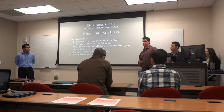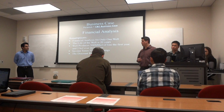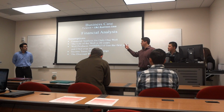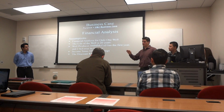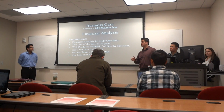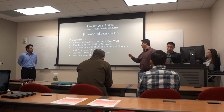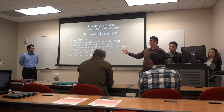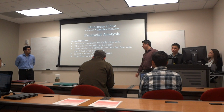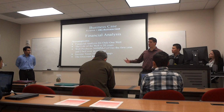Before we could do the financial analysis, there were many things we had to assume just to make sure our financial analysis is run in a rightful manner. So some of the things we assumed were that the financial analysis was done on only one well. We assumed that the life of the well was 20 years. We assumed that the well produced 500 million cubic feet of gas the first year and 2 billion cubic feet over its lifetime. We also assumed an income tax of 35% of earnings and a discount rate of 10%.